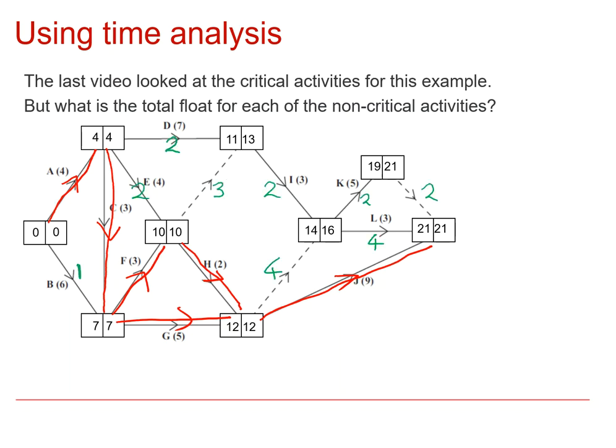So there you can see in green where I've worked out the total float for each of those activities. It's debatable whether it's necessary to do that for the dummy activities. You can obviously work out the total float, but in terms of what practical use that is, it's maybe less important than the other ones. It should be made clear in the question whether or not it's required to work out the float for the dummy activities.